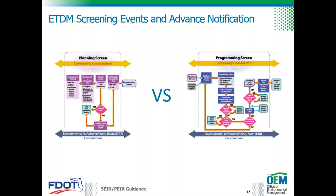This graphical flow chart shows the ETDM process. First, the district decides whether to initiate project screening with either an ETDM planning screen or a programming screen event, based upon project complexity and timing. The ETDM planning screen should occur when considering projects for inclusion in a cost feasible plan. During the planning screen, comments from the Environmental Technical Advisory Team or ETAP members and the public help FDOT and metropolitan planning organizations identify environmental considerations to assist in assessing projects for the long-range transportation plan.